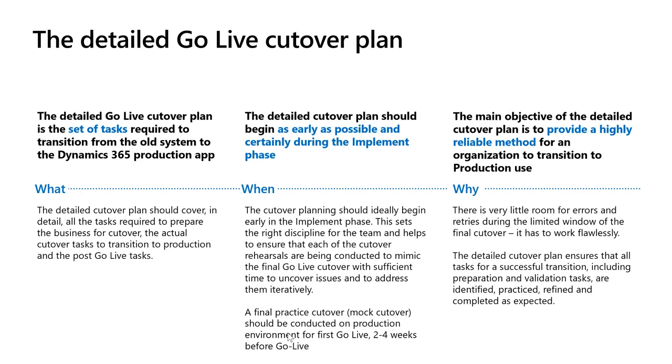And when should you start it? As early as possible. In the early days, of course, it's just going to be a skeleton, right? It's going to be a shell with some placeholders. But as you go through the implement phase, you should be filling this out into more and more detail. And it should be ready by the time you are going to be doing user acceptance testing.